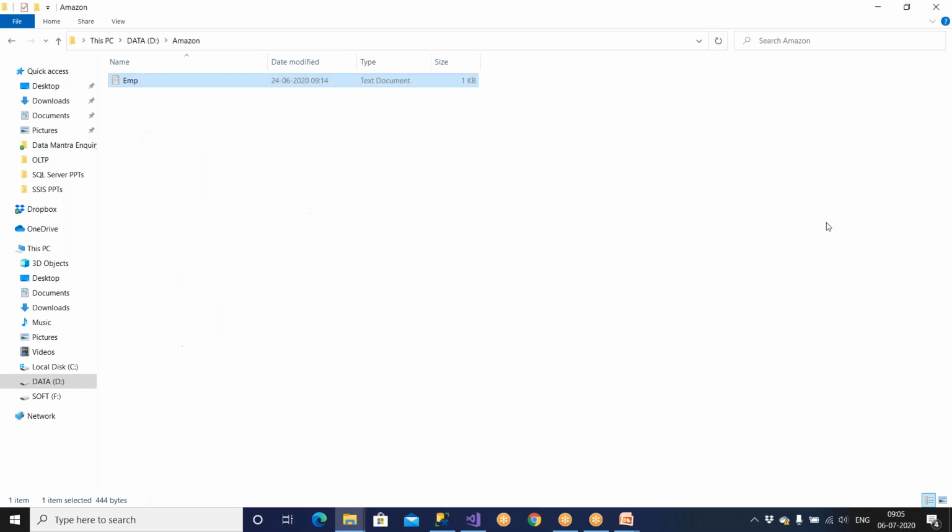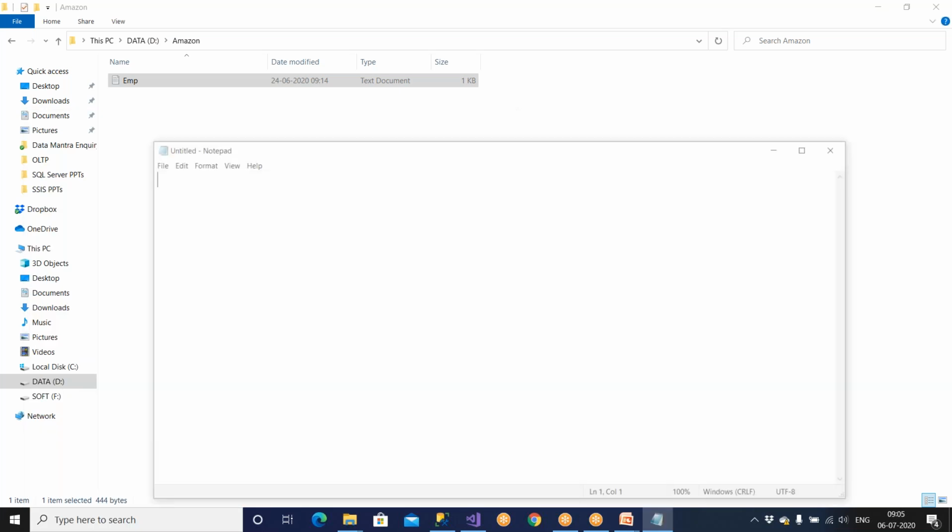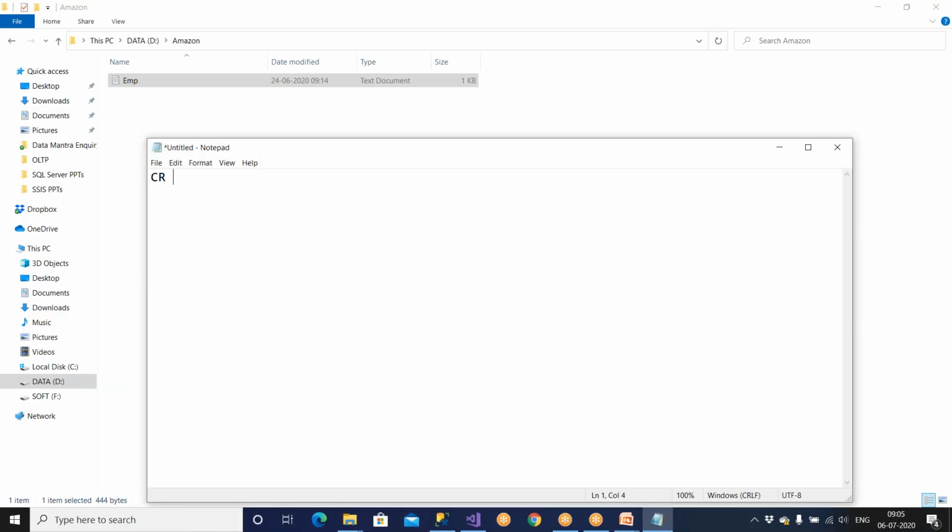To change something, a change request process happens in companies. If you want to modify something, you cannot just add it. A CR has to be created, CR number 1, 2, 3, 4. What is that? You need to add 2 columns to the package. For this, the team lead will understand the changes and say the budget will be 25,000 USD. The duration for development, let us say 3 months, or let us say 45 hours.